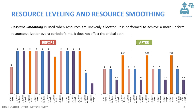Please bear in mind that in resource smoothing, time is the constraint. You cannot extend the time anymore, so you are smoothing the resources within the time period that is assigned for the package. As you can see here, our figure from resource leveling which leveled the resources...